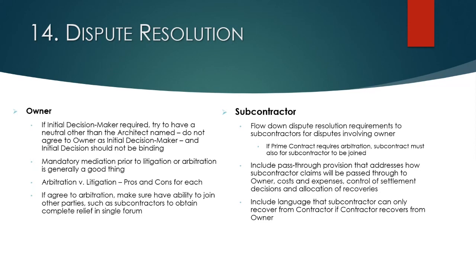Arbitration is, in my view, as expensive in big construction defect cases, construction bond cases, or any sort of construction-related case, because you're going to have arbitrators that you're paying and filing fees that you wouldn't incur in litigation. You don't pay a judge to decide your case. You pay a nominal court filing fee, but you don't have all the other fees. So that component can be expensive.